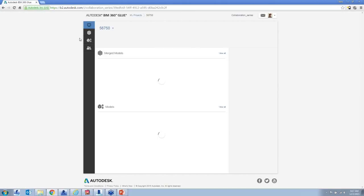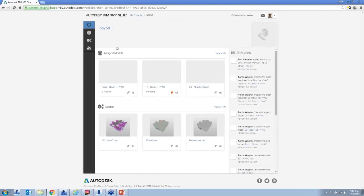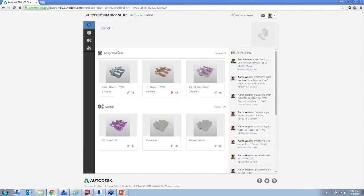Going back into the 56750 project, we have models listed at the bottom showing all models loaded into the project, and a concept called merged models. When you're preparing for clash detection — for example, electrical versus HVAC — you tie those two models together and perform clash detection. That's the concept behind merged models: which two or more models do you bring together for your analysis?